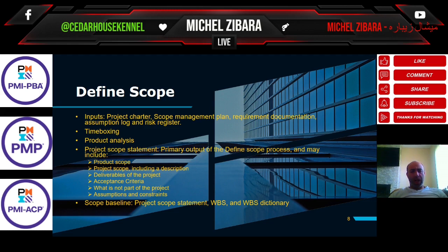Project scope statement is the primary output of the define scope process. The main output, we said we have inputs, we've listed them, tools and techniques such as time boxing and product analysis, and we have the outputs of the define scope process, and we have several outputs, among them product scope, project scope including a description, project boundaries including a description of what is in and what is not in the project, deliverables of the project, the acceptance criteria, and the assumptions and the constraints.